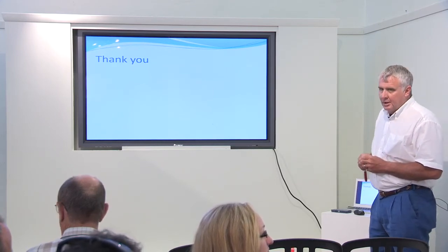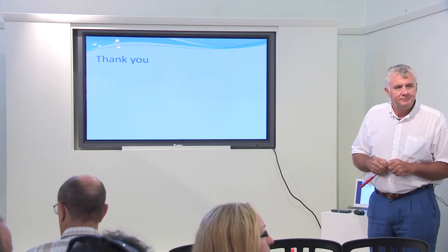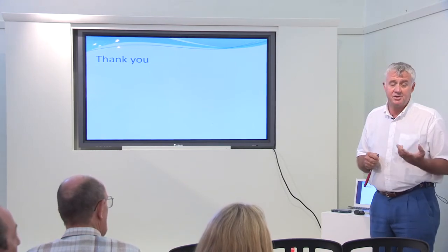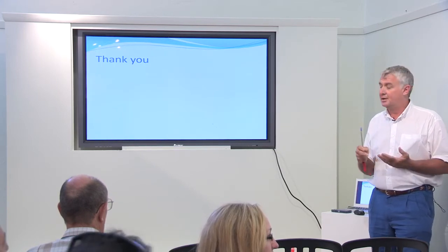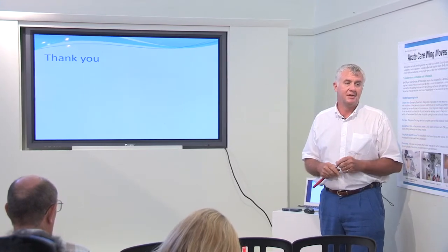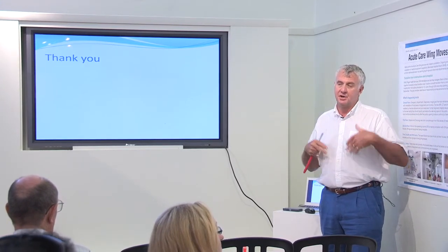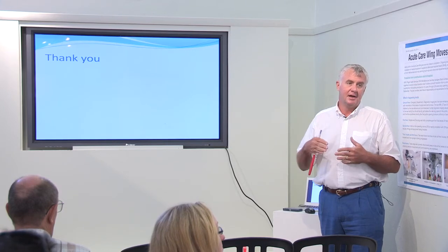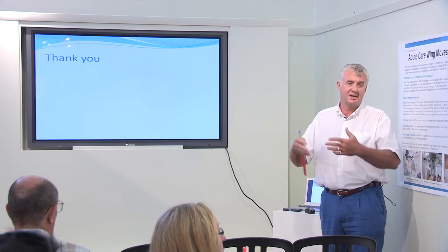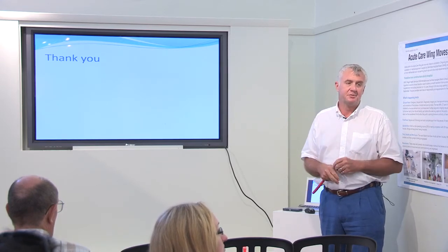Anybody else have questions? I didn't hear you mention when this is up and running. It's functional at the moment, although it's still going through its commissioning phases. One of the requirements of the memorandum of understanding with the Department of the Environment is that it now has to go into a testing stage to prove that we've done that. As the construction works at the hospital come to completion and the startup works begin, that will happen through the next 2 or 3 months of the summer.